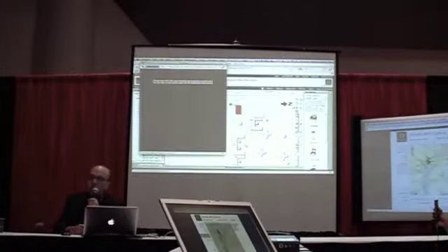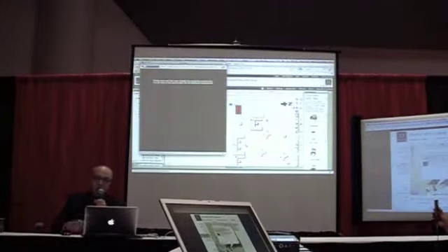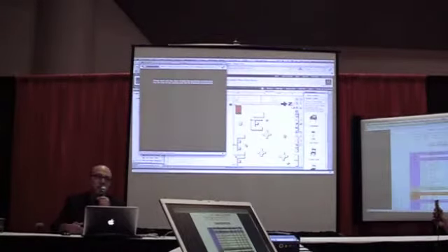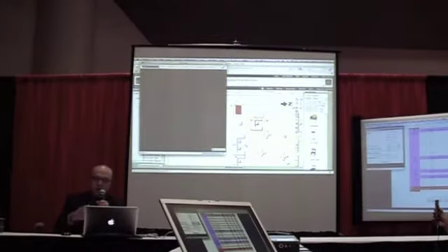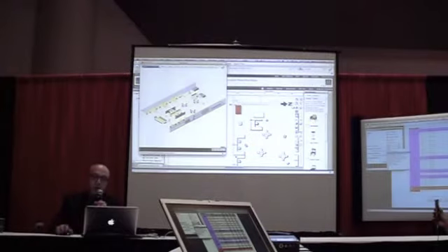In the typical process, you go to a meeting, you meet with a client, and the client says, well, I want to add another desk, or I want to add another piece of equipment, or I want to make this room bigger, or I want to add a floor to the building. You say, well, fine, we'll come back in 2 weeks with a new PDF plan and a report of what that really means. Putting it in front of them like that and saying, well, you asked us to add this, here's the square footage, here are the cost implications, here's how it fits on a site, you start a dialogue right there in the room. And that's how you can start making faster and more accurate business decisions.